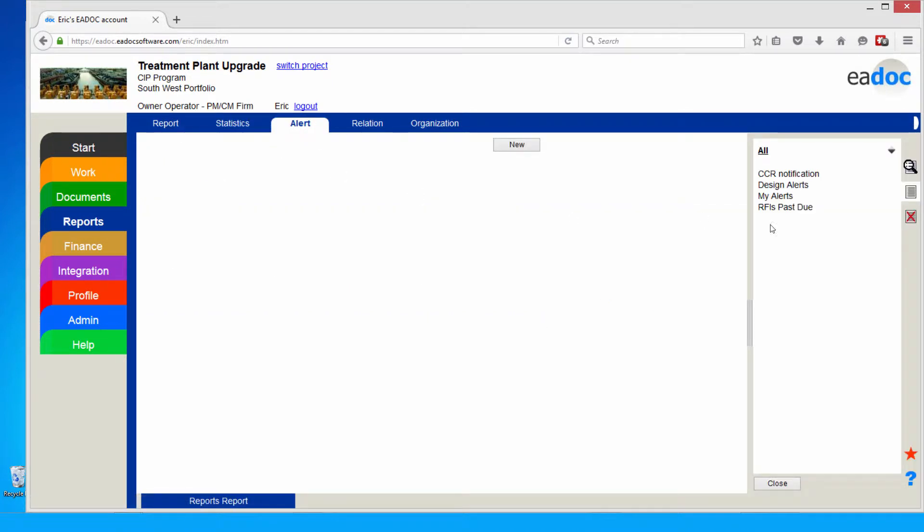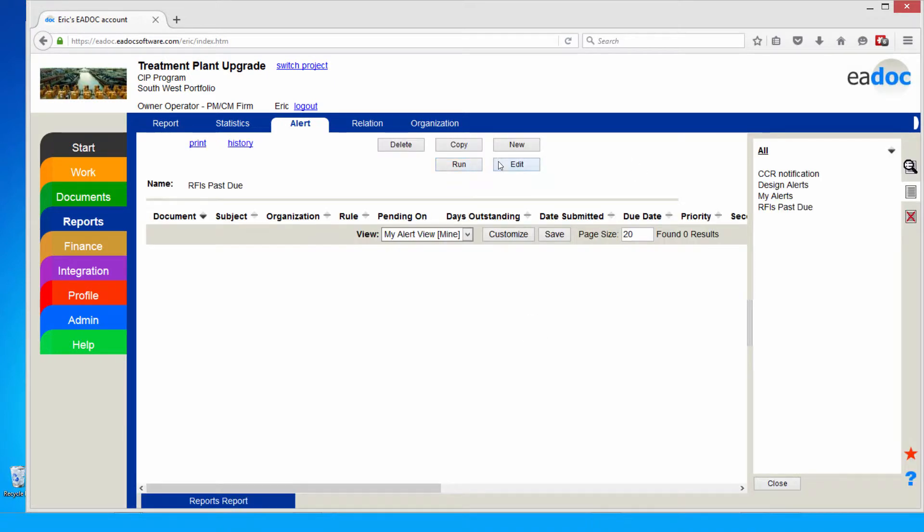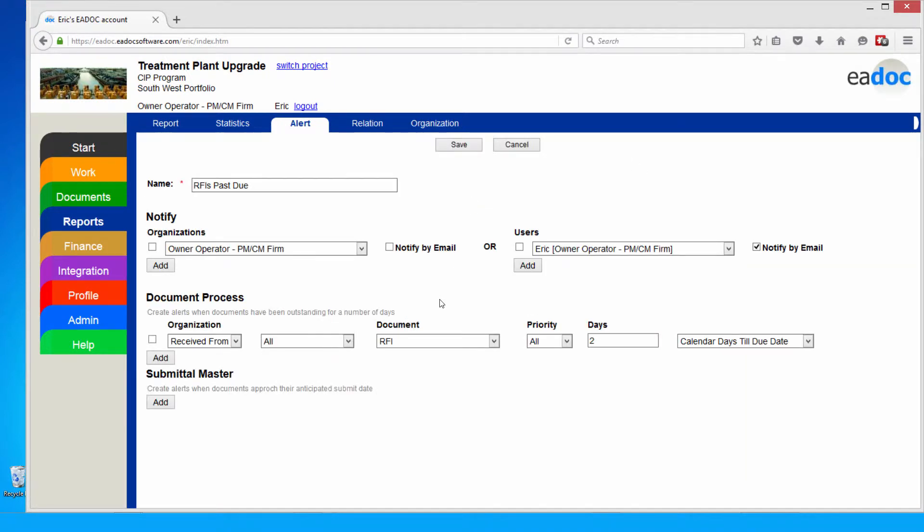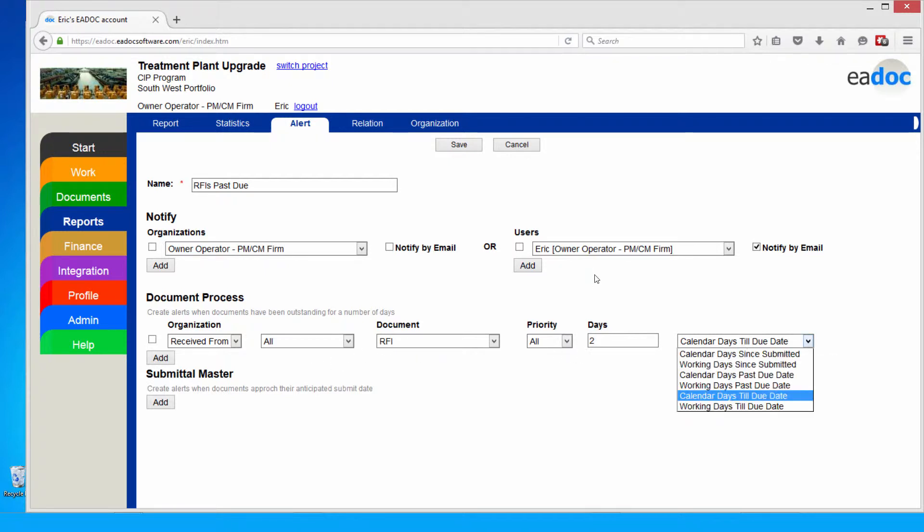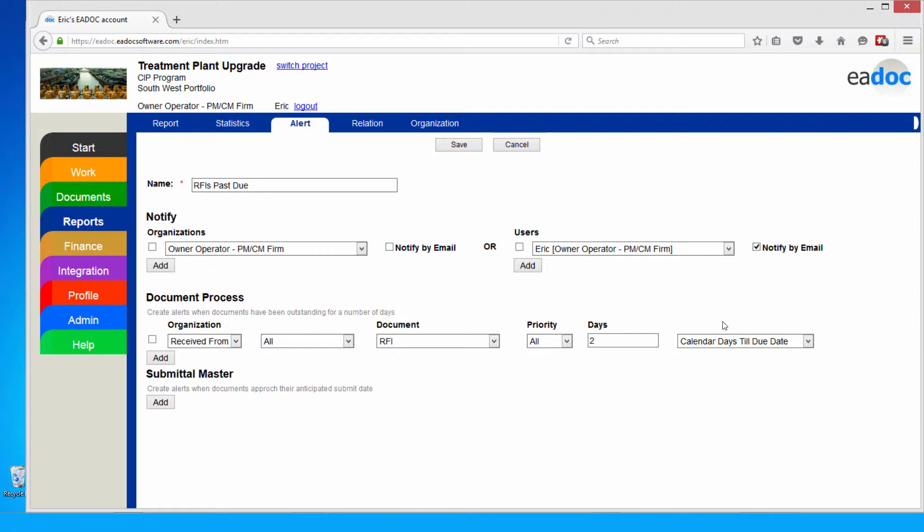To help you with your statistics, you want to take a look at things like alerts. I can configure notifications here in the system. I can say, every time an RFI comes in, if it gets within two days of a due date, tell me about it. This is great because software is excellent at monitoring this every single day. Instead of me as a user having to remember, did I run my RFI log? What's outstanding today? I'm going to rely on the application because it works 24 hours a day, 365 days a year. Anytime anything meets my criteria, it's going to tell me about it. It can do it through an email notification or a dashboard alert as well.